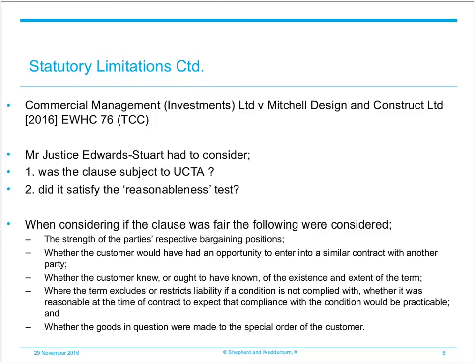On the first point, the judge concluded that it was not necessary for Regorco's terms to be incorporated in their entirety, and that instead, to the extent that the terms and conditions contained certain clauses that were non-negotiable, those clauses would indeed be considered standard terms and conditions, and so for that reason, even if other terms were negotiable, UCTA did apply to the subcontractor's exclusion clause.